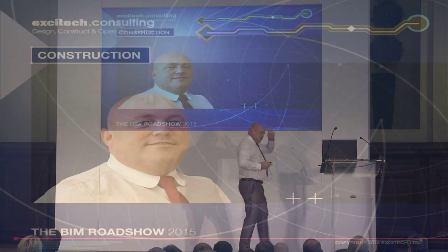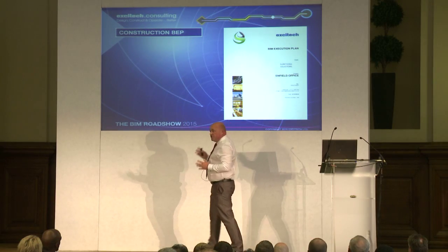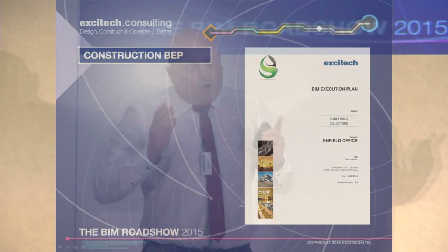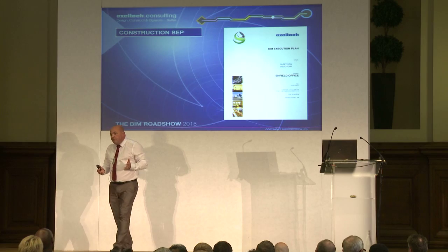Lots going on, lots of modelling information, lots of geometry information. And the first thing I'm going to do is develop this BEP, the BIM Execution Plan. The architect had developed one, but it's a very, very design-focused BIM Execution Plan. What I've got to look at now is how I develop this design BIM Execution Plan and move it more into construction. Because I've got to consider not just my team, but my subcontractors, the manufacturers, the fabricators out there, even the decorator, even down to that level.